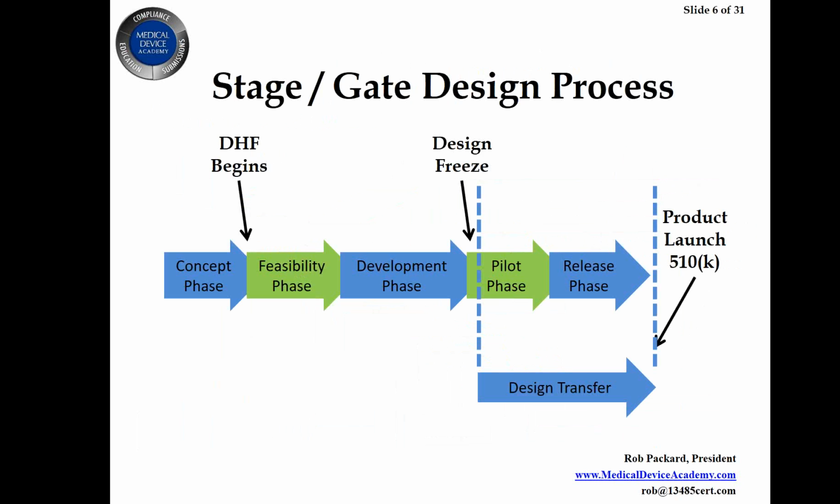The next thing that's on this form here is design freeze. Design freeze isn't an official term. It's a slang term that most design teams come up with. But the freeze concept is you're not going to change your design anymore, because now you're going to invest money in design verification and validation. And that's when design transfer occurs. So you approve those design outputs, the drawings, the specifications, the purchasing information for the suppliers, and you don't make changes from that point forward. And you might leave some things flexible and not approve them until a little bit later, but there are certain things that are long lead time items that are critical path, and you're going to freeze them as early as you can, because you want to order those items.